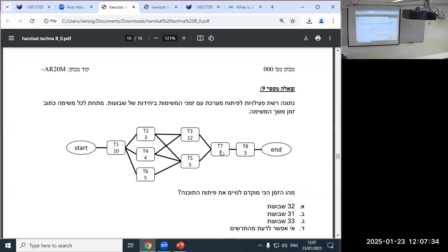Why don't you say that T7 and T8 work at the same time? Because by definition, T8 can't start until T7 finishes. Maybe it's because of the workers, or really probably because of the system. It needs to use certain features of the system that haven't been built yet, so we can't even start working on it. Something like that. You gotta think of the case of a farmer. It makes more sense there.